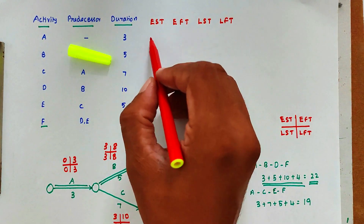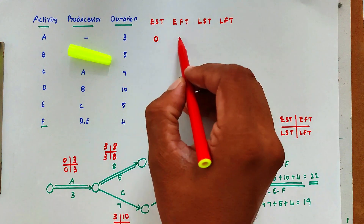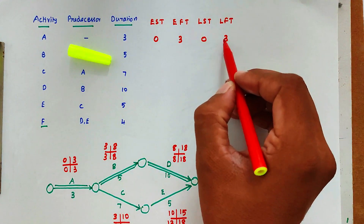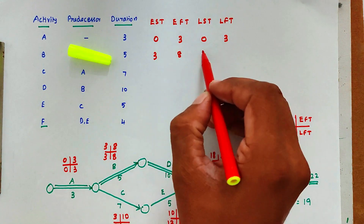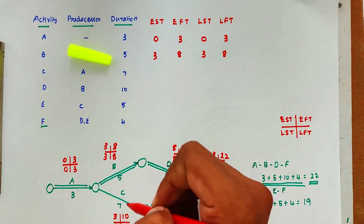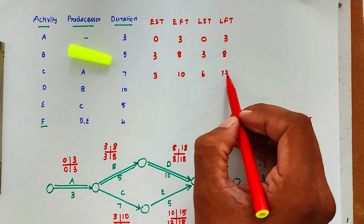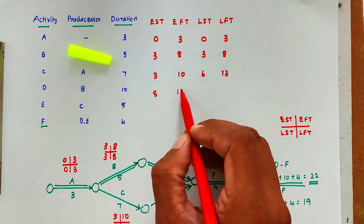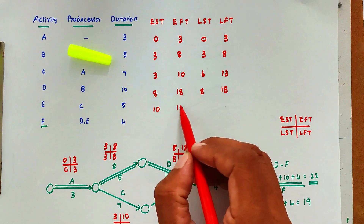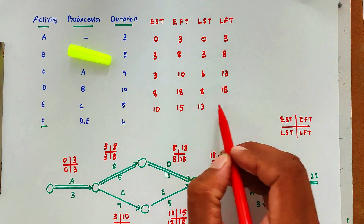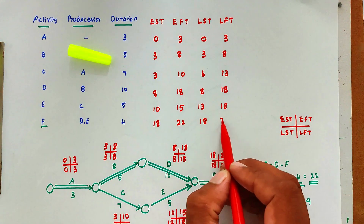So now we can tabulate EST, EFT, LST, and LFT for all activities. Activity A: 0, 3, 0, 3. Activity B: 3, 8, 3, 8. Activity C: 3, 10, 6, 13. Activity D: 8, 18, 8, 18. Activity E: 10, 15, 13, 18. Activity F: 18, 22, 18, 22.